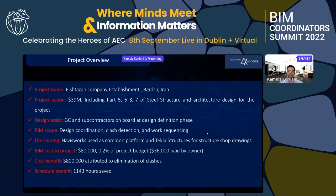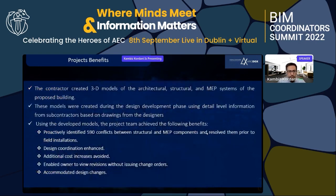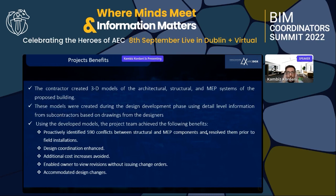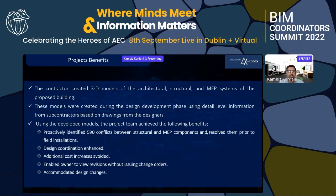BIM cost for the project was $80,000, representing 0.2 percent of the project budget, of which $36,000 was paid by the owner. The cost benefit attributed to elimination of clashes was $800,000, and the schedule benefit was approximately 1,143 hours saved. The contractor created 3D models of the architectural, structural, and MEP systems during the design development phase using detailed information from contractors and designers, eliminating potential risks associated with open sharing of digital models across stakeholders.